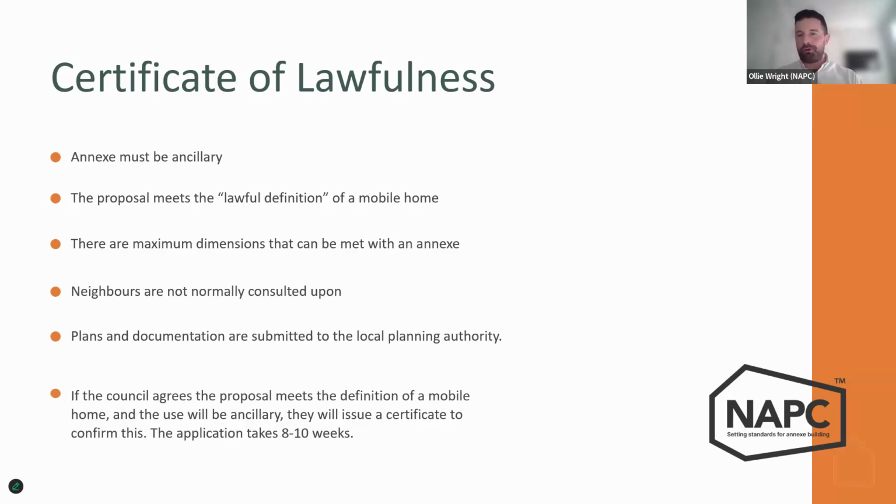We then compile another planning application and a planning statement, looking at all the legislation, looking at all the law, and we will then spell out to the council why we think that this structure meets the legal definition to be considered a mobile home and therefore doesn't require planning permission. And then we submit that once again to the council. It takes about 8 to 10 weeks with the council.